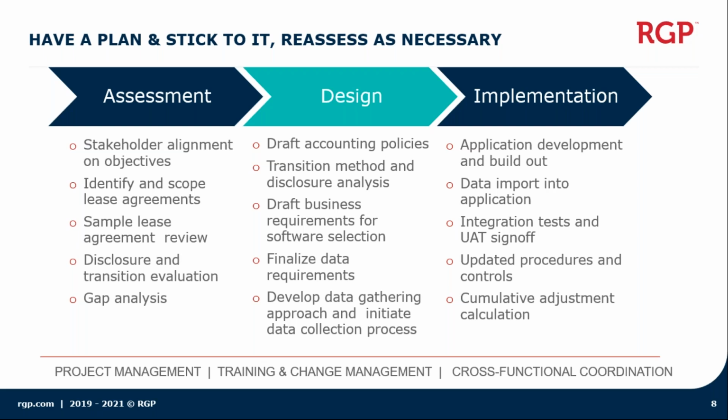But if we fail to plan and fail to capture all of the activities and manage that through a formal project management governance, we typically can see those project plans ballooning to 6 months, 8 months, even a year, when those interdependencies and those work streams are not fully captured and identified and managed. So I think from an overall project perspective, the main hurdle or challenge to overcome is to make sure that